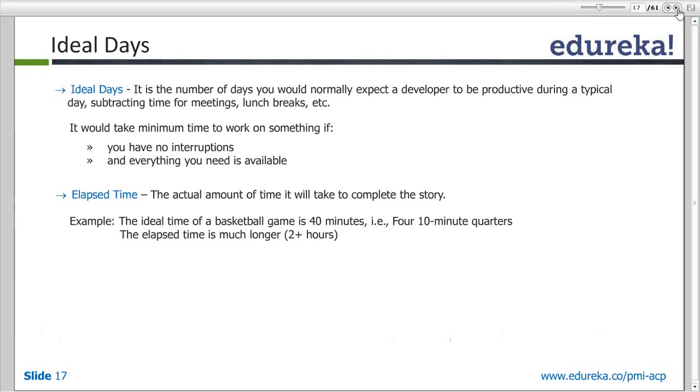Yes. So I have planned a story of 5 hours, but it took longer. Since my testing team was testing, I got into a discussion with them. They found some bug and I was trying to analyze it because I could not see that bug. I needed some clarification, so I was having a meeting with the product owner. To achieve that 5 hours of work, you spent an additional 3 hours to achieve what was actually required. So that's your elapsed time. Your elapsed time was 8 hours, while your ideal time was 5 hours. Had there been no distraction, everything would have been smooth, and you would have spent just 5 hours. That was your very ideal time.